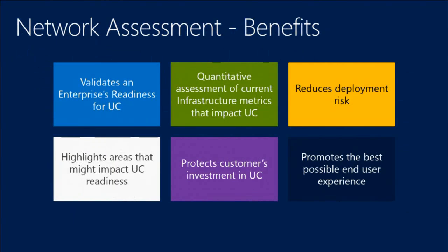The real benefit of the network assessment is that you reduce the deployment risk. If you just deploy link and you hope it will work, then you have always the risk that you will fail, and it won't. If you do a network assessment before you actually introduce any telephony, any real-time communication, then you will know upfront. Before you need to install a single link client, a single link server, you will know upfront if this will be a success from a networking perspective or not.